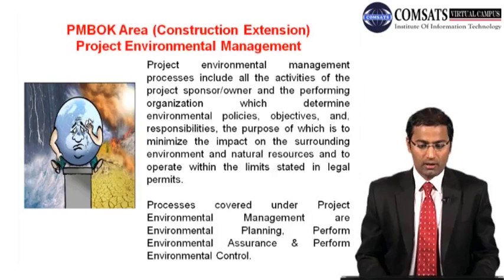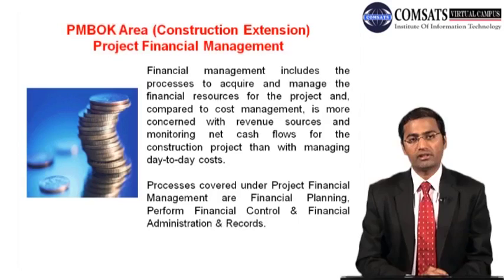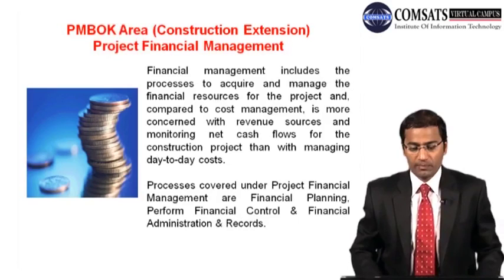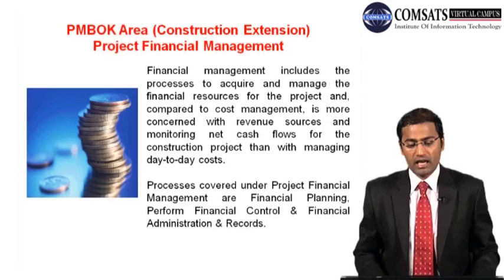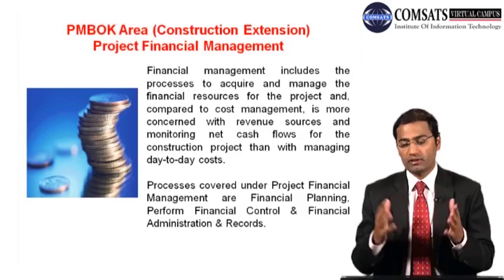And another very important parameter as far as construction is concerned is project financial management. Financial management includes the processes to acquire and manage the financial resources for the project, and compared to cost management, it is more concerned with revenue sources and monitoring net cash flows for construction projects than with managing day-to-day costs. So in cost management, we do day-to-day costing, and in financial management, we manage the revenue sources and their cash flows.